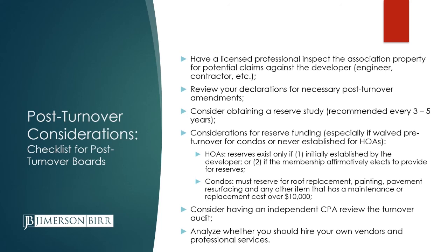And so both myself and other attorneys at this firm have been involved in some pretty significant construction defects litigation, and I know that I've had a case where we settled with the developer because there were some very significant defects that were discovered about 8 years after turnover. And those were condominiums that sold at generally $130,000 or so. And the settlement to make the repairs to the condominium was somewhere in the $24,000 or so per unit amount. So, sometimes the defects can be significant even if you don't see them.